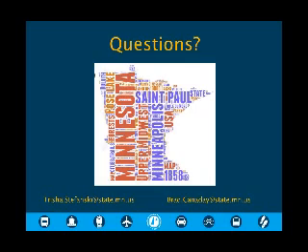Well, the contract that we're letting on 694, 35W, and 10, the Cadillac version, is roughly $10,000 a mile is what we've got for a bid, where they're pulling out everything. They're doing the scanning, the targeting, all the control work, and then all of the extraction into the databases. So they're doing everything, and it's coming in around $10,000 for each mile.